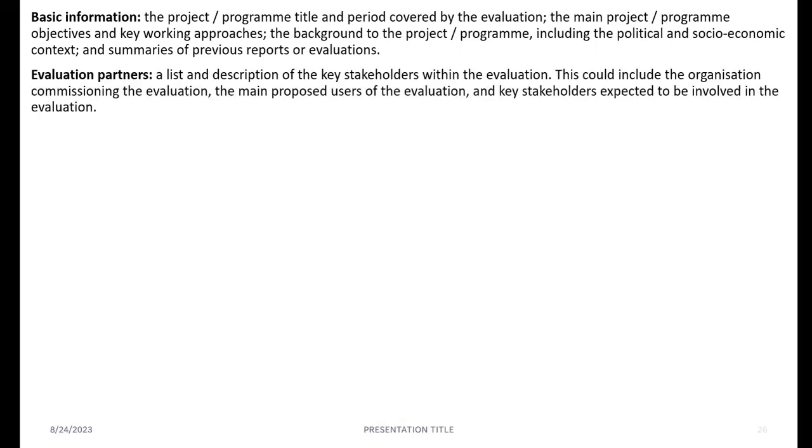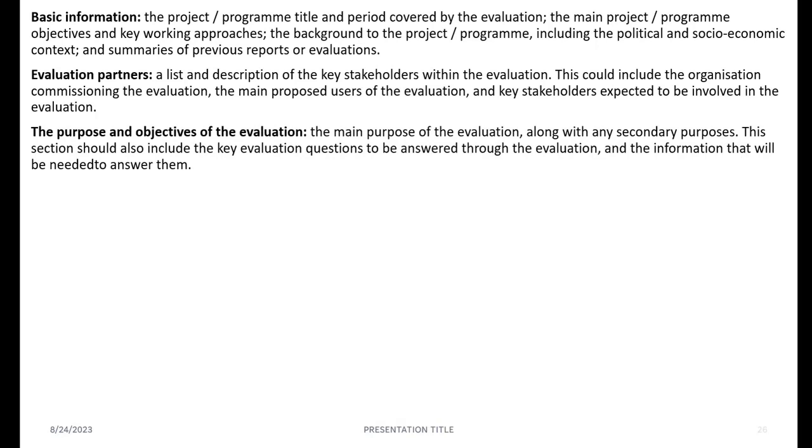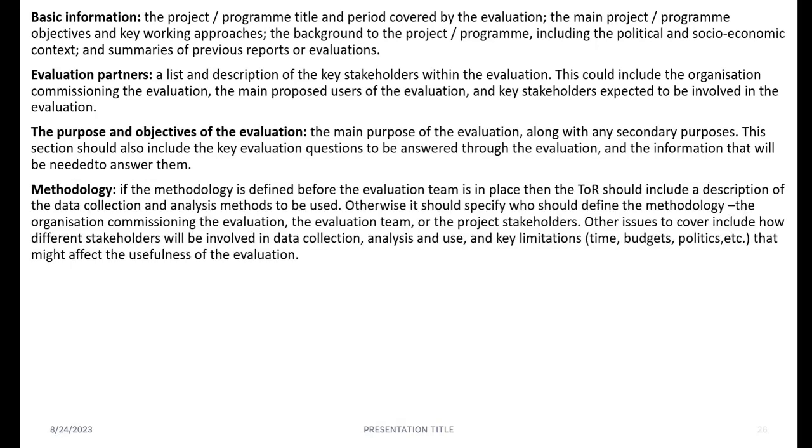Here you provide some basic information of the project which is going to be evaluated, what the evaluation partners are, the purpose and objectives of the evaluation, and the methodology: which type of methodology you want the third party to use, how they are going to assess the project effectiveness or conduct the evaluation, what type of data collection methods, etc., they would be using.